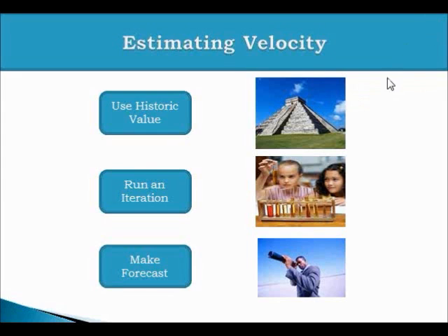So forecasting a velocity is a process where you may do an engineering breakdown or a work breakdown of your given stories, do an ideal hour estimate, and then reverse calculate the amount of work a team can do in a given iteration.